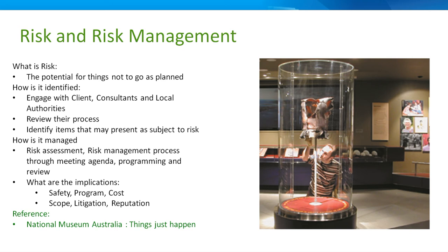And we've got an example that happened this year, which I'll come to, which we were amazed at. And it's affecting the whole industry. In fact, you would have all seen that building that burned down in England, the Alucobond polyethylene cladding. We've been using products like that at the request of one of the clients, and then it went from a normal product 7 years ago, then the fire brigade wanted the fire-rated product, and then they wanted it mechanically fixed.